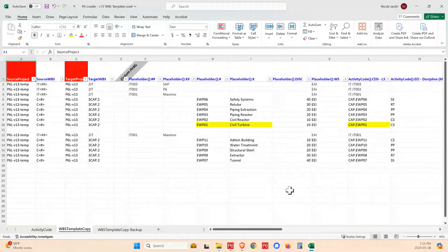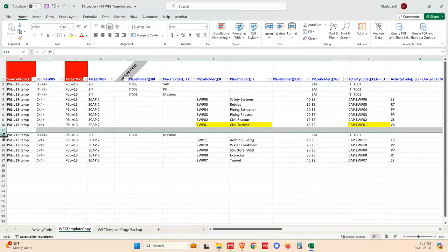Okay, so I'm going to load these rows up to this last line. These ones, it's going to ignore. So that's how P6-Loader works. If you put a break line or an empty row, it stops there. And that way, as you're working out your structures and your etc., you don't have to load it all in one big shot. You can do it in multiple loads.